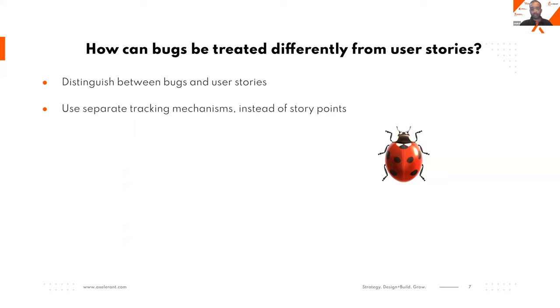Don't give story points to your bugs. Otherwise, you know, the team will have more bugs, more story points, but the value driven out of the sprint is diluted. Biggest agile antipattern. You add story points to your bugs, the objective of the sprint is completely diluted.